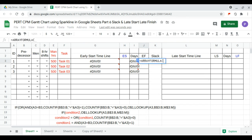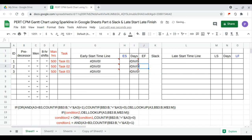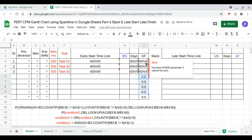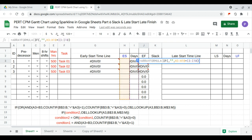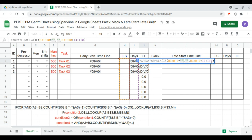We continue with the finish day column — an array formula: start plus duration. We need to clean this up as well. We add a condition: if the start day column is empty, then it should be empty; otherwise, calculate.